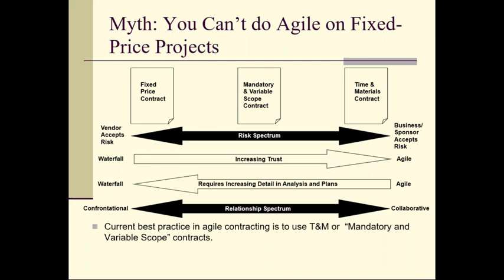But remember, this is a high change project. We're using Agile because this is a high change project. So which items are in which iteration, or whether they're even on the list at all, may change. That's okay. We're just trying to set an expectation. So if I say I can do about 50 points per iteration, let's add some contingency again, because there's some risk in here, right? Because there's change happening. So let's add another 20%. So let's make this 50 points, 60. I've added 20% contingency.